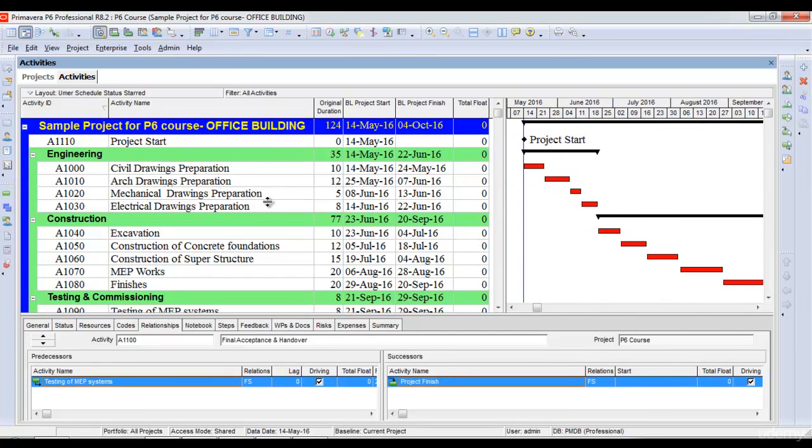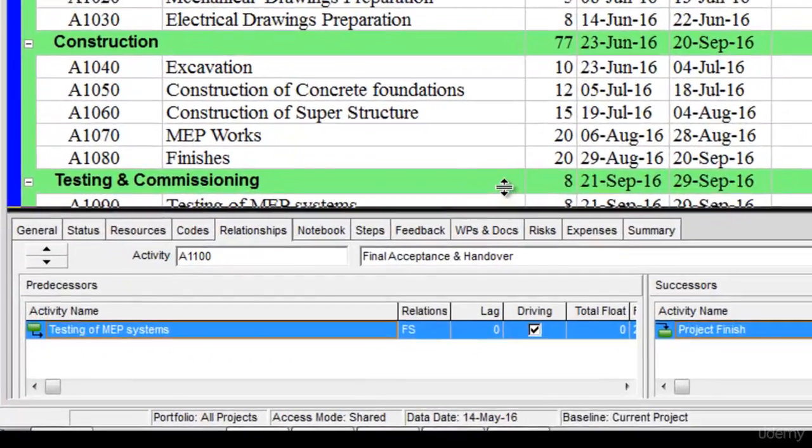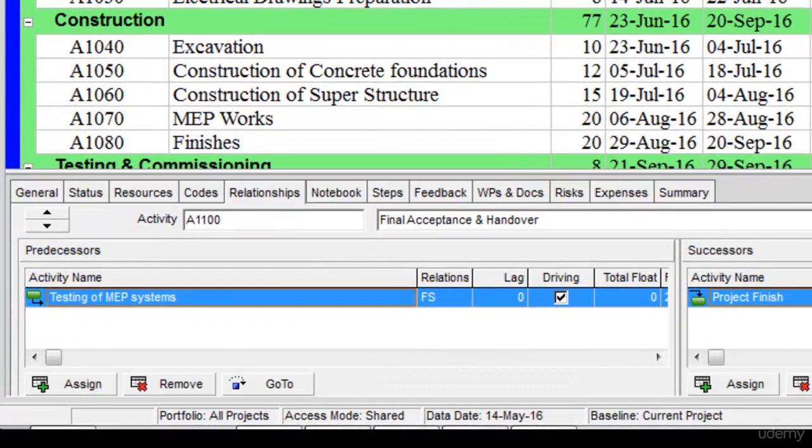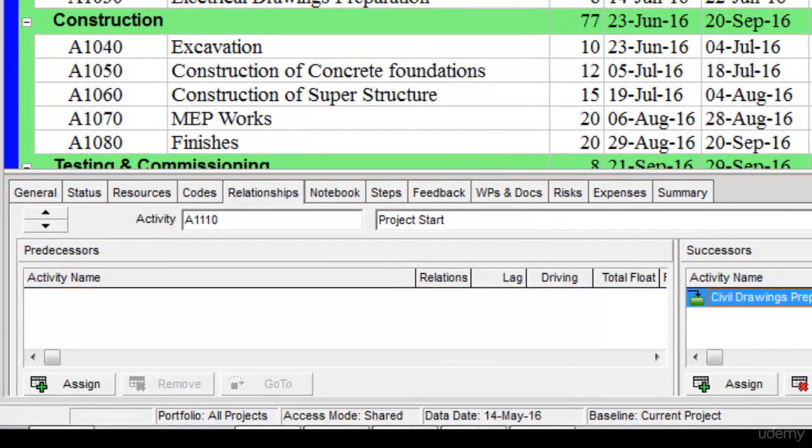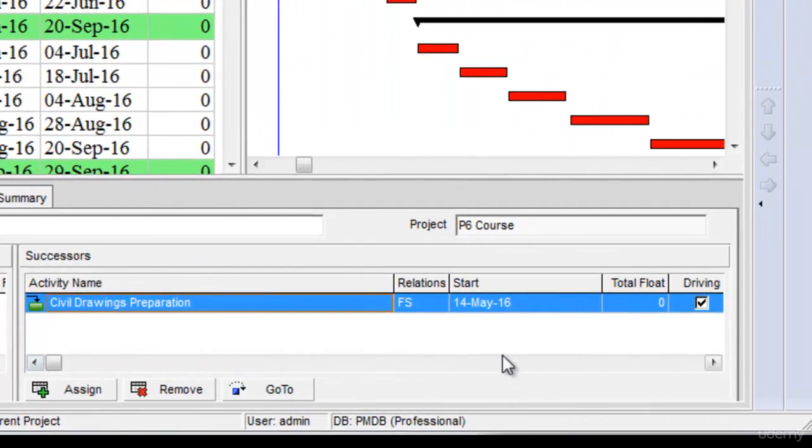One more thing to note: once we create relationships, the default relationship type is finish-to-start. For example, if I select project start and go to its successor, you'll see the relationship type is finish-to-start.